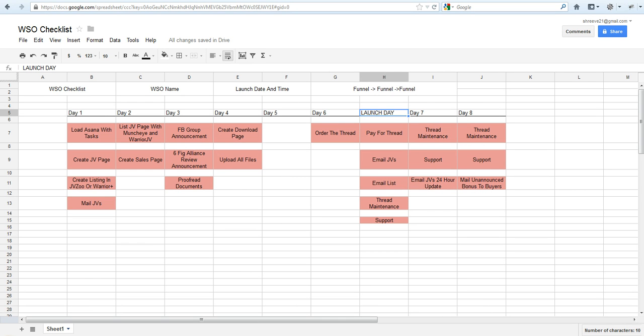And the last thing that I want to show you here is I actually learned this from an architect friend of mine. When they do their big project boards for building buildings, they'll have all their tasks laid out like this across the calendar, just like this. And then when they finish a task, they will simply mark it green, so that what happens is you can get a really good visual, like, okay, we did this one, we did this one, we did that one. It's pretty easy to see what needs to be done and get a real easy visual on the percentage completion for the task that you have at hand. So this is what I used. It's really, really helpful, really, really handy.